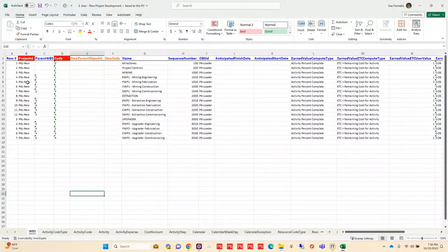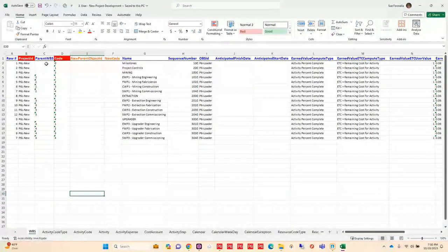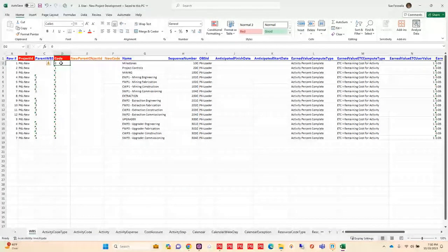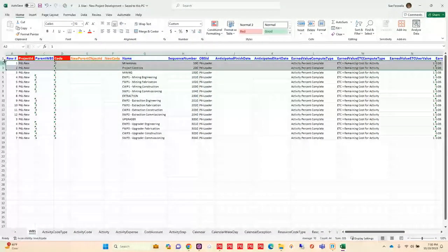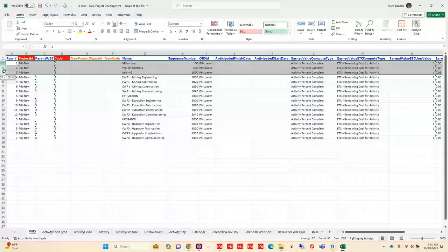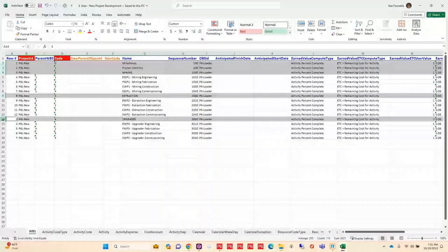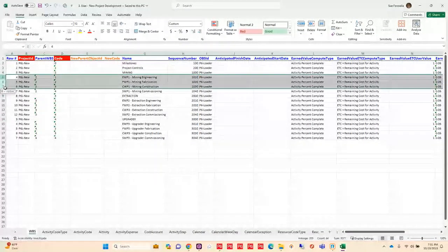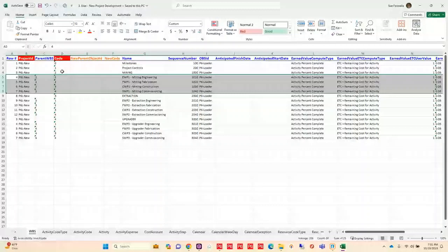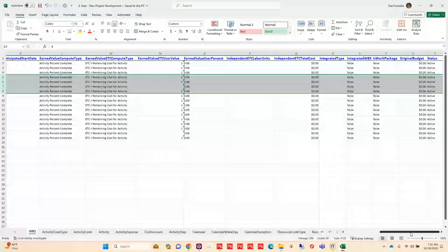So in my WBS, essentially I'm creating it. I'm putting some hierarchy in here. So I have my first levels that I'm telling it, okay, I want you to put it underneath the project here. And that's on this one and this one as well. Those are my level ones. And then for my level twos, I'm actually going to create some children for that. So I'm going to give it the parent WBS it needs to land under and give it a number as well as a name. And anything that you would need to set at the WBS is available on this sheet.